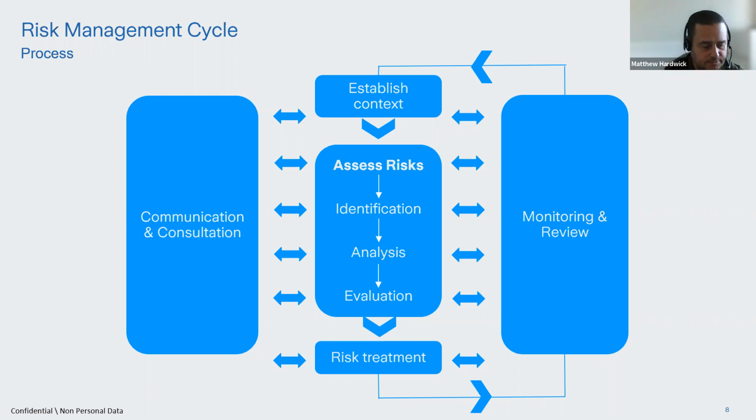And what I mean by that is, by way of an example, I'm often presented with risk registers in organizations, and asked, can you have a look at this? Have we got it right? And there might be something on there that says, do you know what? Service delivery is a risk for us. Okay, well, my first question is why? Why is service delivery a risk? And so you start getting into slightly deeper detail every time you ask why.